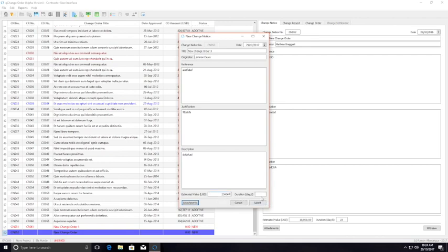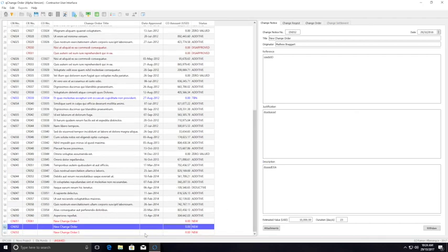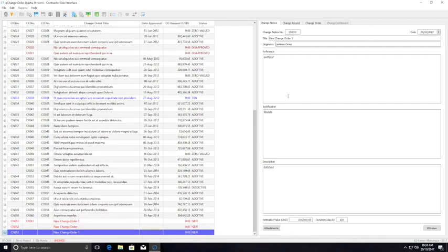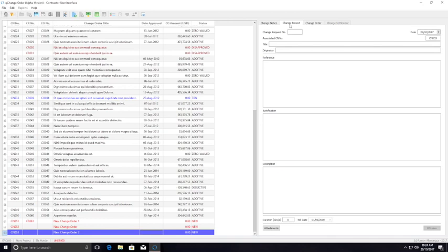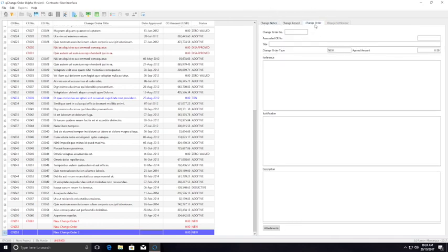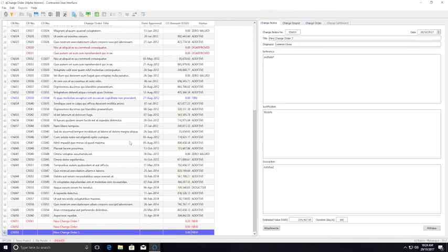Okay. Dollars. This is an estimate. It will change later. Okay. Then 23 days. This one has a limit. Cannot be more than 180 days. So it cannot be more than 6 months. So let's have 100 days. So, okay. So now we have a new one again. Okay, with 100 days. No change order yet, and no change request yet.